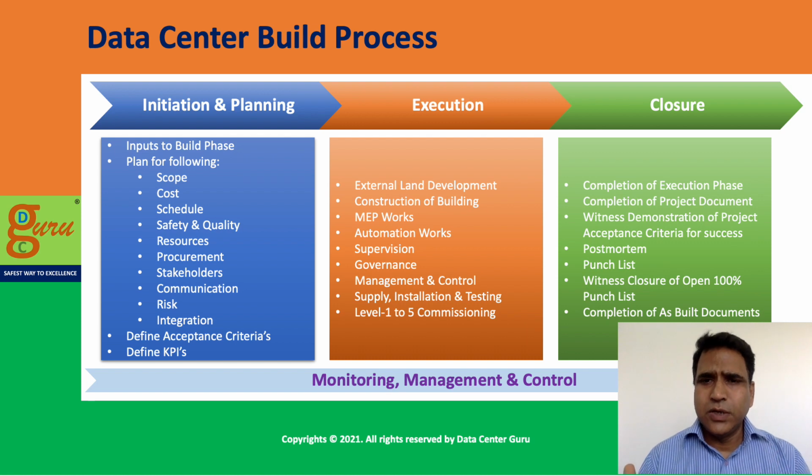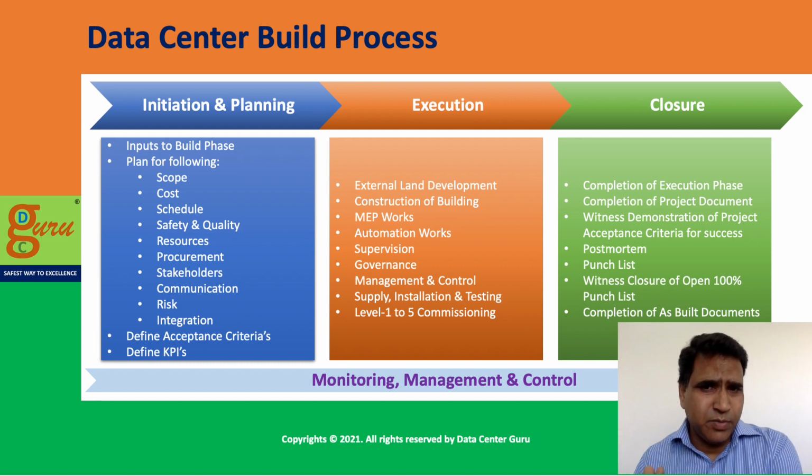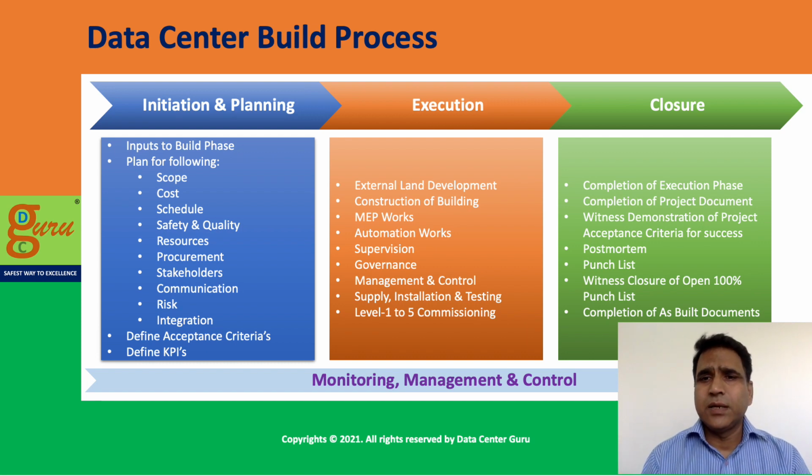Normally, if it is a greenfield data center, the first thing is the development of the land. Second is construction of the building, people also call it core and shell. Then fitting out with MEP, mechanical, electrical and plumbing work, and then setting up the entire automation network including safety, security and other systems on the site.